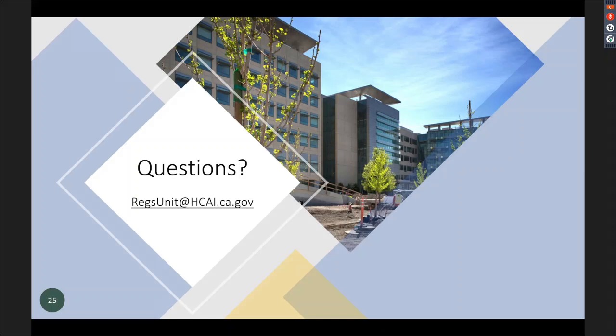We are constantly asked to review RFI logs. We are constantly asked to review RFIs. Yes, the forms may be very similar or may be identical, and you just put RFI 1 versus NMA 1, depending on what it is. We don't care which form you use as long as the information is on there. But if it comes in as an RFI form with an RFI number, we are not going to review it.